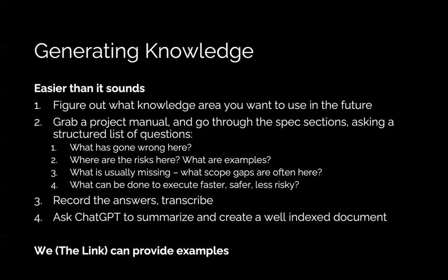You can record the answers, transcribe them, and here's the fun part. Ask ChatGPT to summarize and create a well-indexed document for you. So you can automate a lot of this. So really it winds up being a recorded, guided conversation over lunch, or take an hour and do this. We've got examples I'm happy to share with folks or walk you through this in a little bit more detail. But the point is, and I think for this industry, this is a really important idea and important practice that I hope we begin to do more of, where we're allowing people to share their knowledge.